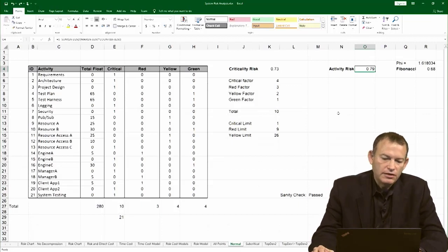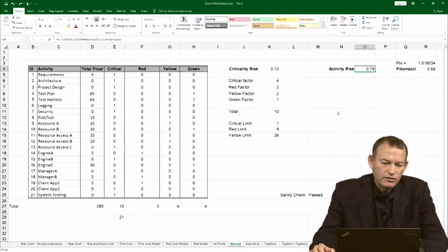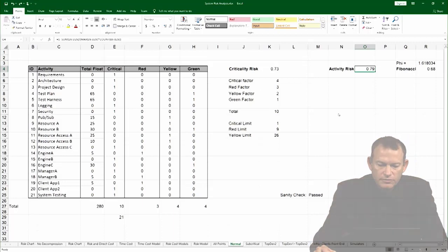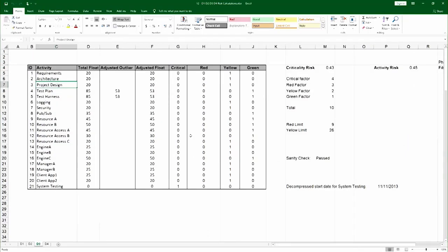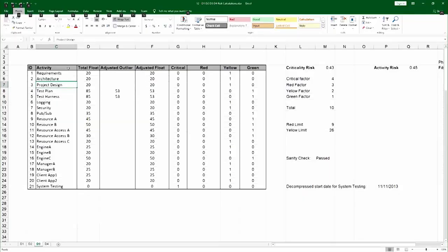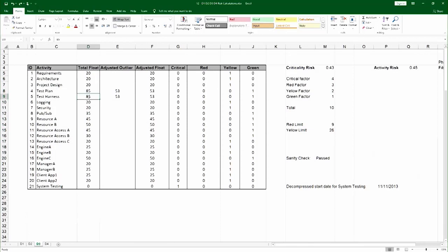Now sometimes with activity risk you have to adjust the floats. In writing software we discussed the problem that sometimes very high floats skew the risk formula much higher, and it's just an artifact of the formula. The activity risk model only works when the risks are uniformly spread across the entire range between the smallest float and the largest float. If you look at this particular project, most of the floats are in the 20 range, but then we have 85 and 85 here. That makes it an outlier.